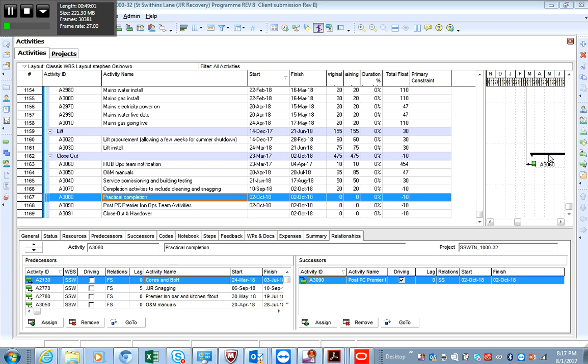Now, prior to that, thank you. So Salma and Naya have explained it in the context that I would like to hear it as one of the project team or the management team, right? Or the representative of the employer. I.e., the terminal float is the margin, the difference between practical completion and the delivery date, the project handover date.